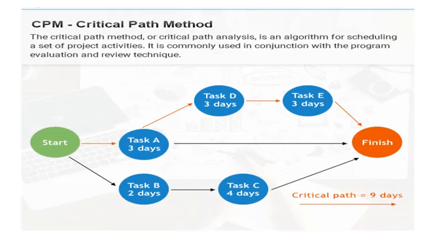Step number 4, 5, and 6, that is measuring the area for certain number of cars, marking and painting all the parking elements, and installation of a gate are sequential activities because they must occur in certain order, right? So in this example, these stages are the most important critical tasks for solving the problem. So you will place them on the critical path of the project. Why? Because you cannot start any stages until other stages are complete, right? So based on this plan, you can determine the duration of each stage and the entire project, right?